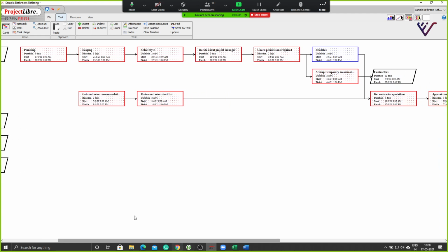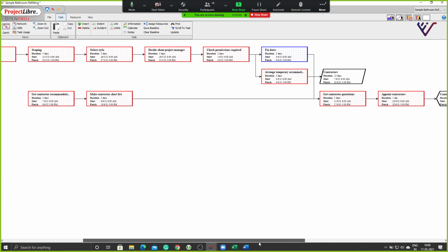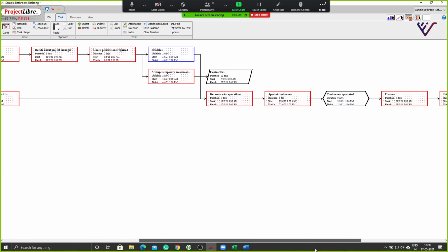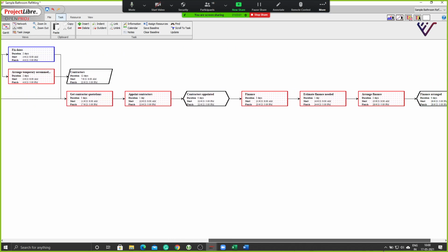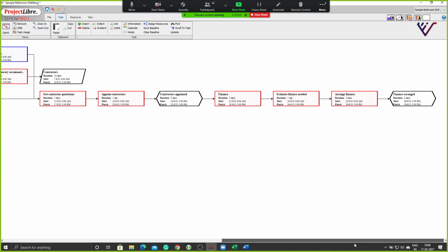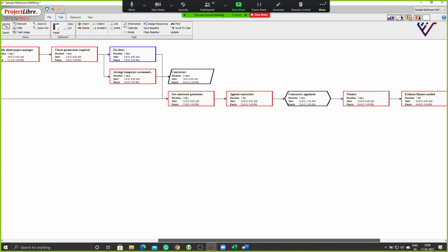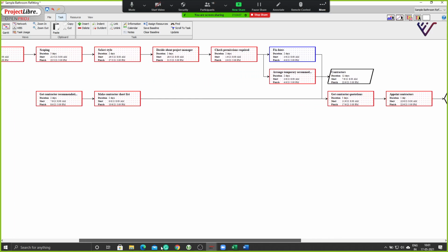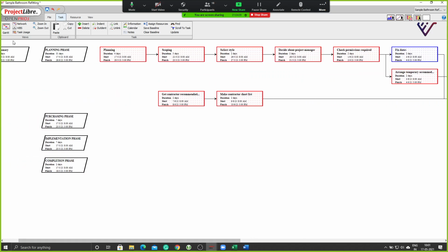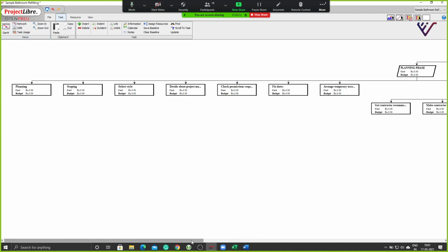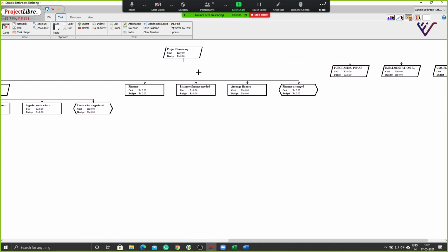But the tasks which we have linked, you notice the red ones are being shown in. So all the red ones are critical path elements. Right? And the black which is denoted in this are the milestones. Okay. And the ones coming in blue are the ones which have free float available. Notice this? The same breakdown you will be able to see in your work breakdown also. So all the works have been broken down and rolled over into project summary.